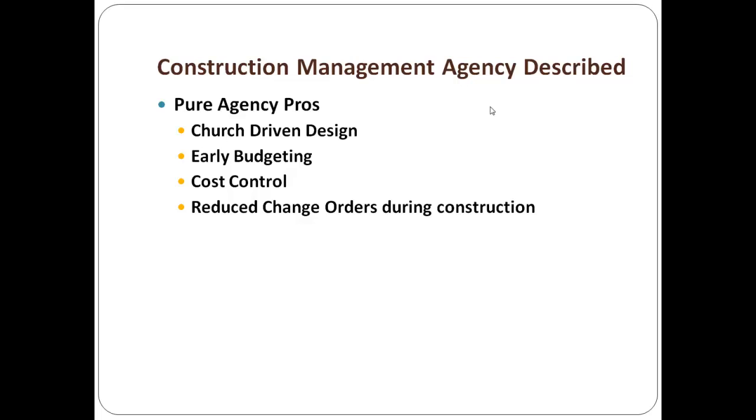It has been stated, and again, I don't have hard data for this, just what the industry professionals tell me, a $1 million building in the United States, when it's put out to bid, ends up costing $1.1 million. I've had some folks tell me as high as 1.3. I know in my exposure and experience of dealing with this with two different national church builders, that we've had to help churches where the plans came back well over 30% over the project budget for the project. And so we want to help you with this.